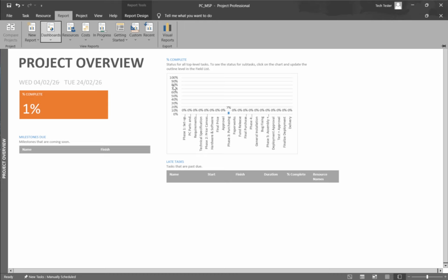Use the Tracking Gantt to see changes, the Variance table to measure them, the Work table to understand effort, and reports to communicate results. With these tools, you can confidently track performance against your original plan and take action where it matters most.